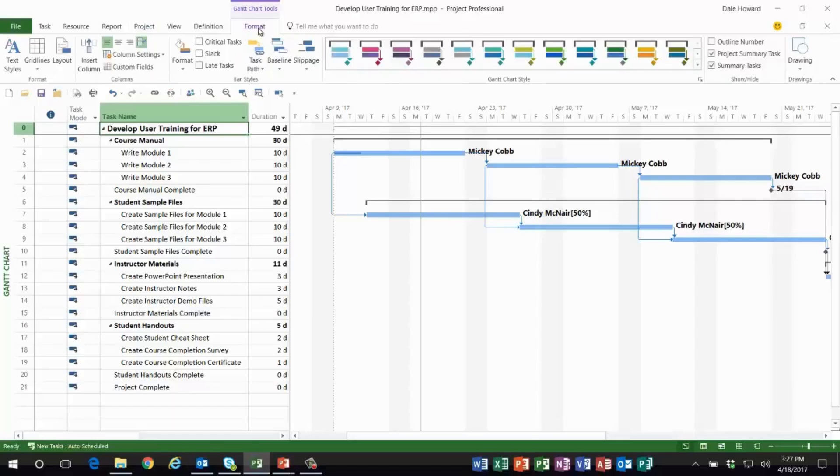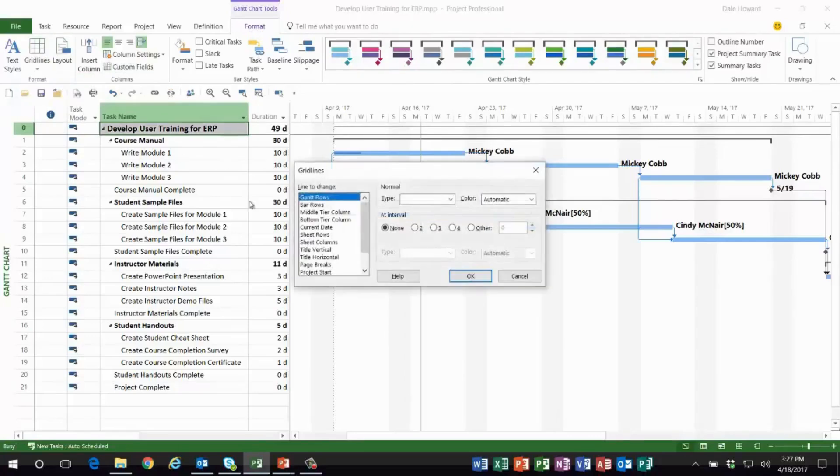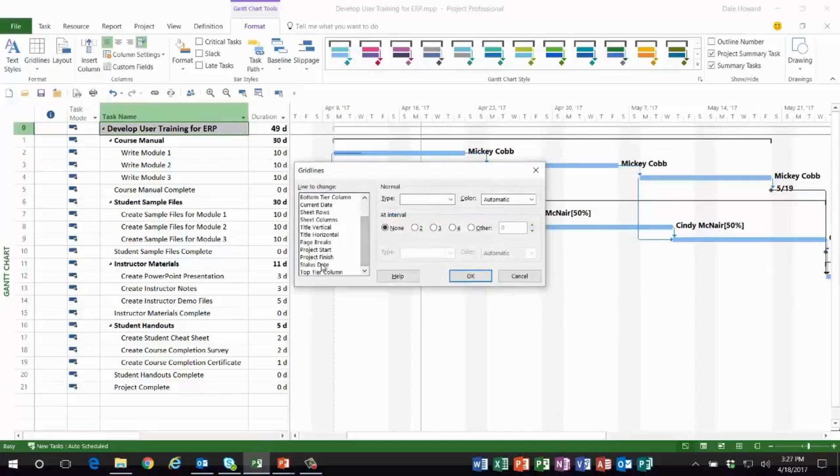display the status date as a grid line: you go to the Format ribbon, Grid Lines pick list button, and choose Grid Lines. In this dialog, scroll all the way down to the bottom and choose the Status Date item. Notice